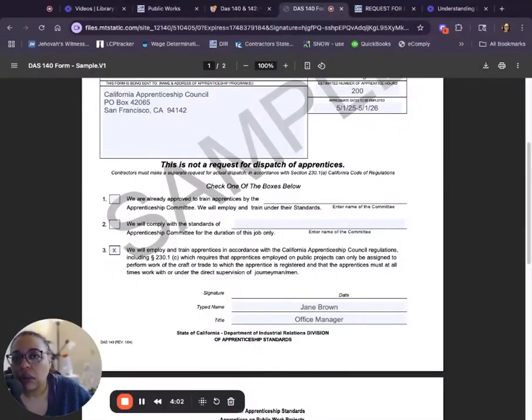Which, if you sign it early enough, okay, you just do a new one. But if you complete it the day they're on site and come to find out a week later, a month later, a year later, you were wrong, they could assess fines in that duration because it'll look like it was never filed correctly. So if you don't know, ask the client, hey, are you union? Are you affiliated with the union?